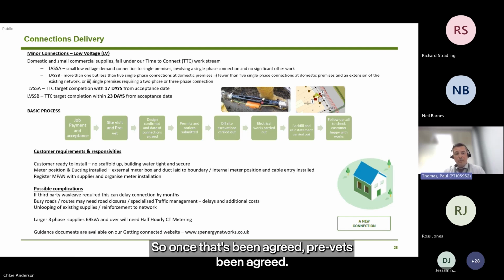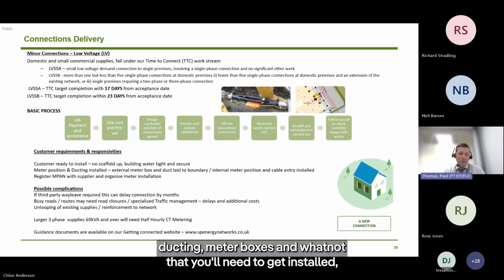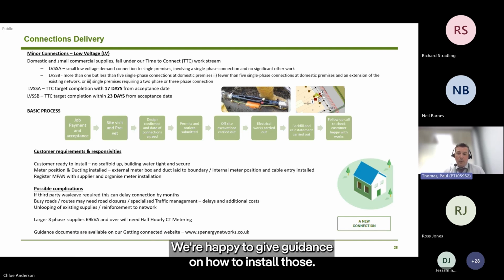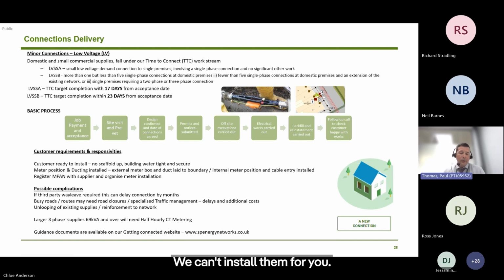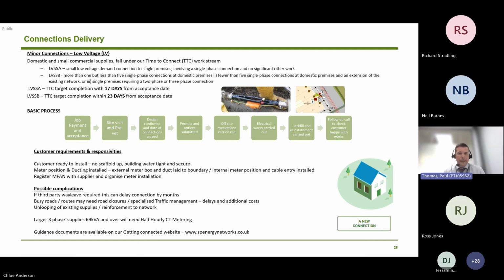So once that's been agreed, the pre-vet will also drop off some materials that you might need for your connection, so ducting, meter boxes and whatnot, that you'll need to get installed before we turn up to site to actually carry out the works. We're happy to give guidance on how to install those. We can't install them for you, and cable entry points and that you'd have to do yourselves as well, but I'll talk to that regarding customer requirements towards the end.